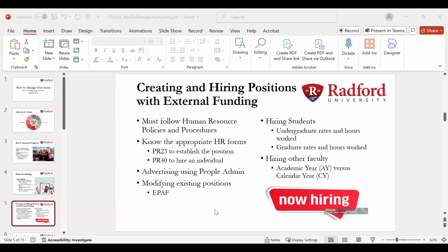If we're hiring these students through payroll or through HR, and like I said, they're enrolled full time, there'll be no FICA. We can talk when we write the grant, but if they're receiving some other type of remuneration, like a stipend or whatever, that doesn't even run through payroll. That comes out of a different line item. So there will be no FICA assessed on that.